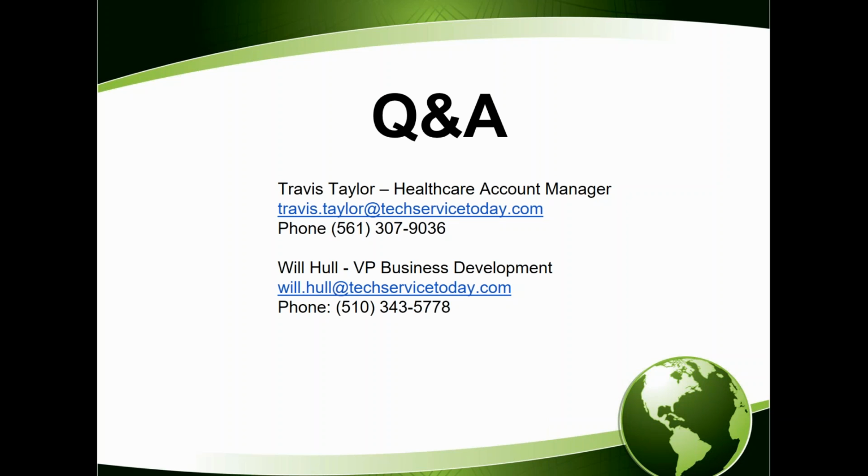What do you recommend in terms of closeout documents, how to handle? Okay, good question. With any of these kind of rollout projects, inevitably you're going to have some kind of site checkoff form. Usually there'll be a timesheet that needs to be filled out. There may be a checklist, a completion checklist, a testing checklist that you want the site contact to fill out. What we recommend is that when you have the technician on site, simply take a picture of that document and send it into your help desk.